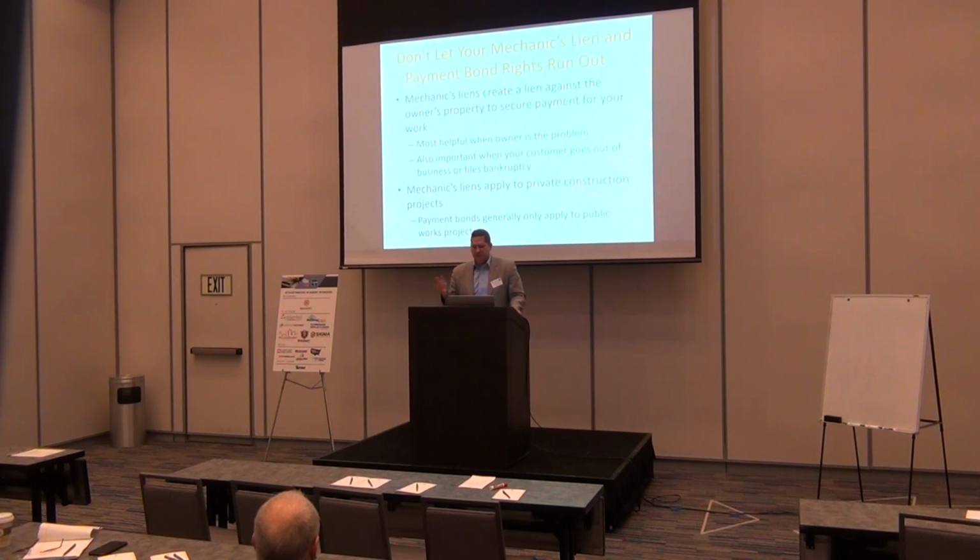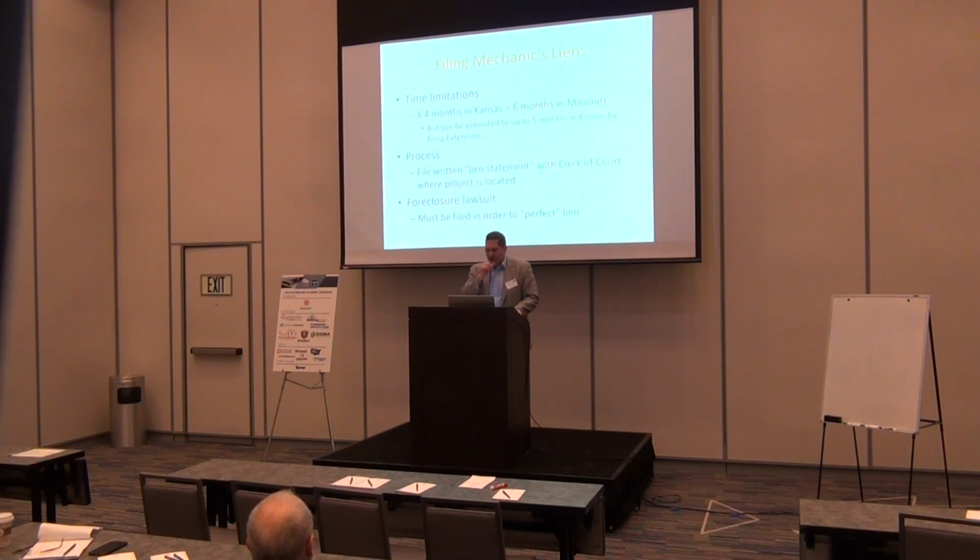Well, in that situation, in fact, we had liens, et cetera, and we were able to win that case. But that's a situation where having your lien rights is going to put you in a better legal position. So a mechanics lien applies to a private project, so a private owner. If it's a county, state, city, school district, whatever, they have to put up a bond, and then you can't lien it. You can't file a mechanics lien. Obviously, you don't want mechanics liens filed against the local school or something like that. But there's a bond that's out there that serves the same purpose.